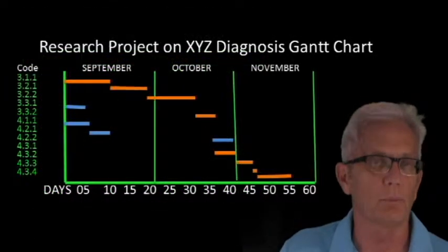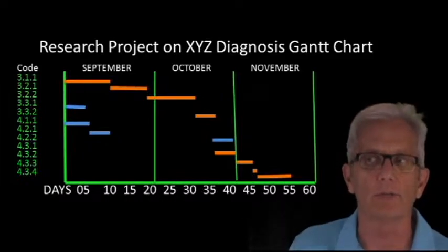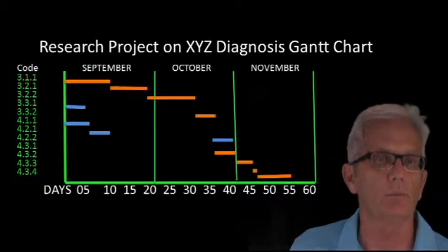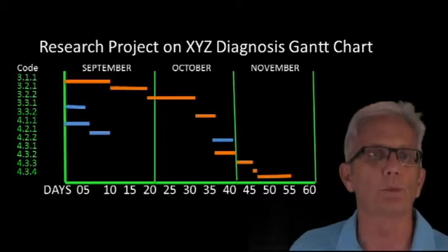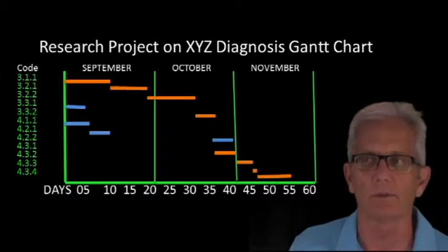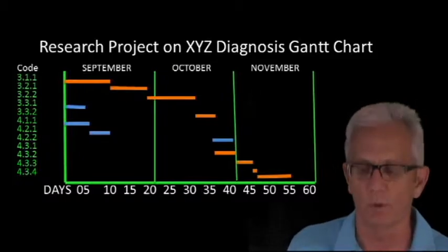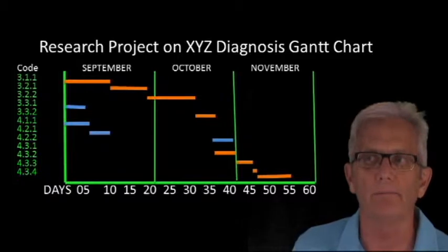And so we can put our Gantt chart schedule across that, and we can see exactly when they'd be. For simplicity, in this example, we're going to assume we have 20 work days per month. That's kind of average, but of course with holidays and things, sometimes they're 19 or 21 days. And we see when each activity is there.